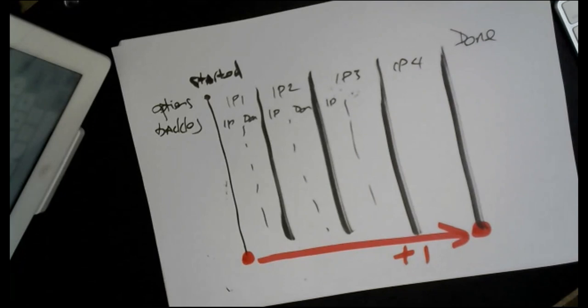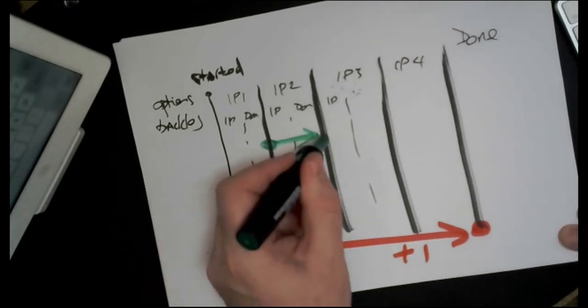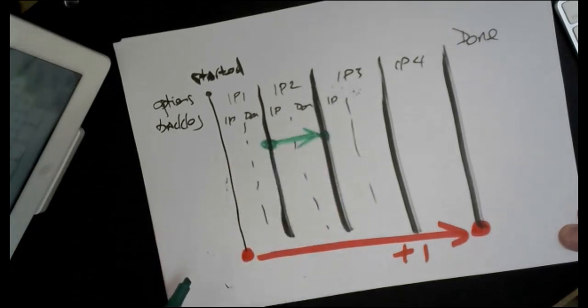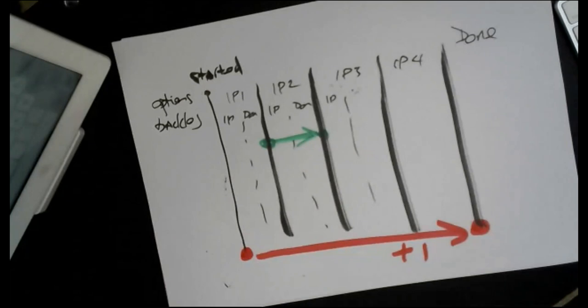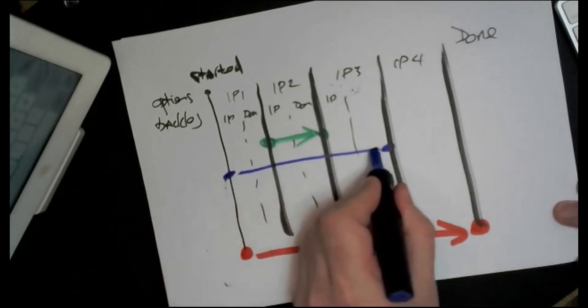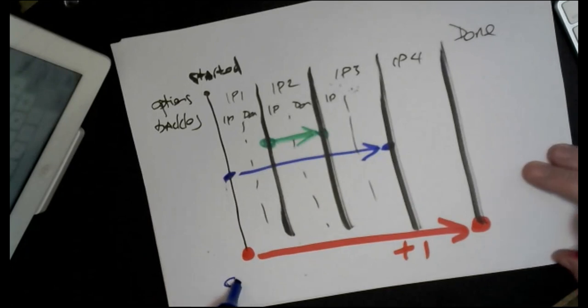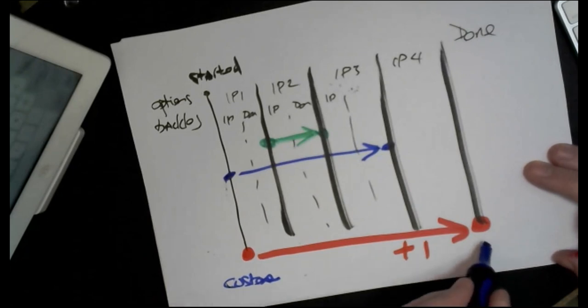But you could have a number of cycle times, because you might have other people in the team who only care about this particular column. That might be the start point and end point for that particular work in progress. Or you could have other people who are interested in a different start point, and they might be more interested in getting from here to here. The important thing is that you agree at least one, have one, and one is usually enough. And this is usually: when do we tell a customer that we're going to start this work, and when do we actually deliver to the customer? It might be end-to-end customer cycle time.